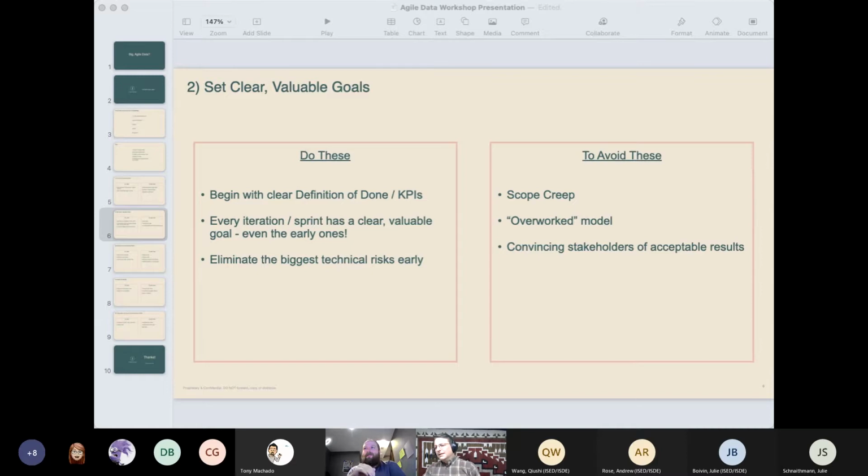Oh, God. We love low-hanging fruit. Yeah, that's a great question. I would say neither. I would start with the most valuable problem. So I would line up all of these problems on a 4-blocker, and I would maybe map them out by size or severity on one dimension, and then in the other dimension, I would map them out by ease of resolution.